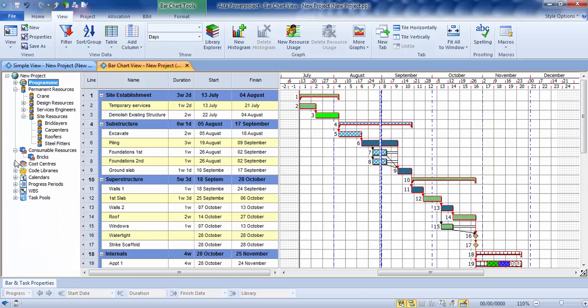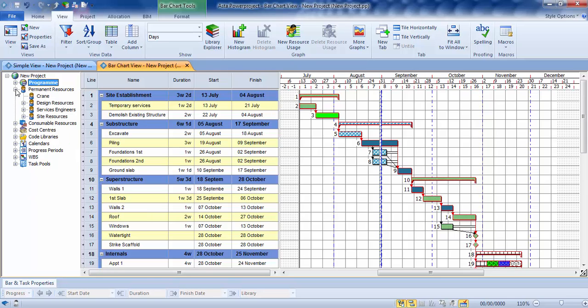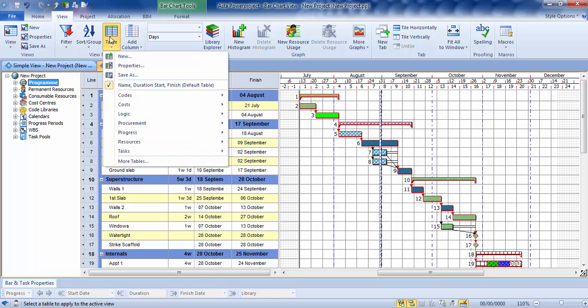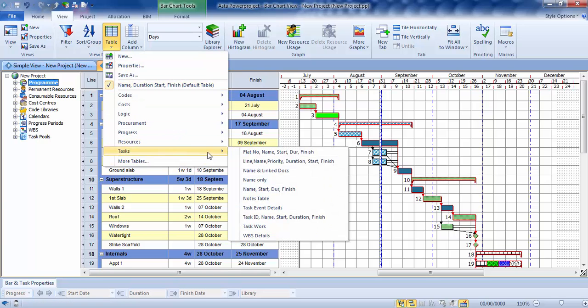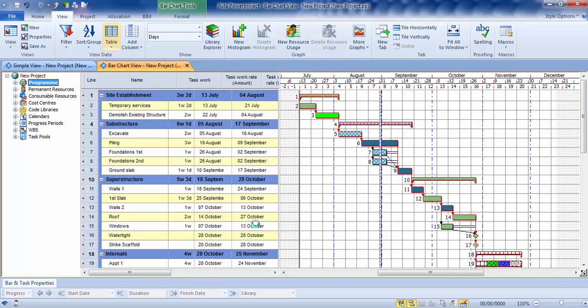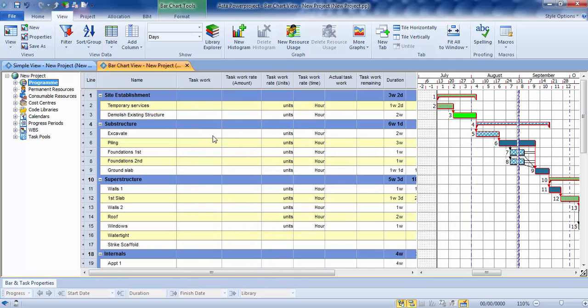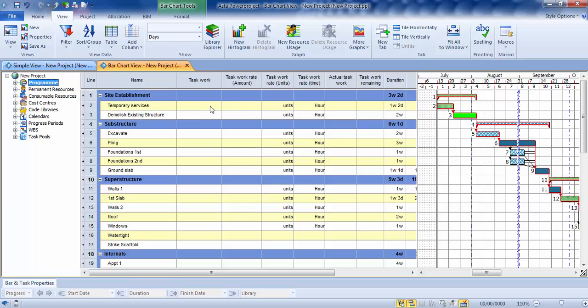Now before I talk about this in any more detail, what I want to do is just go into something which is sort of a little-known feature of Power Project which is called task work. There's a pre-defined table which you'll find here, and table and then task work. So we have this here. Now the reason this is here is so that you can go in and type in an amount of work, work rates, and then it'll work out just how long a task is going to be based on work rates and the amount of work that has to be done.